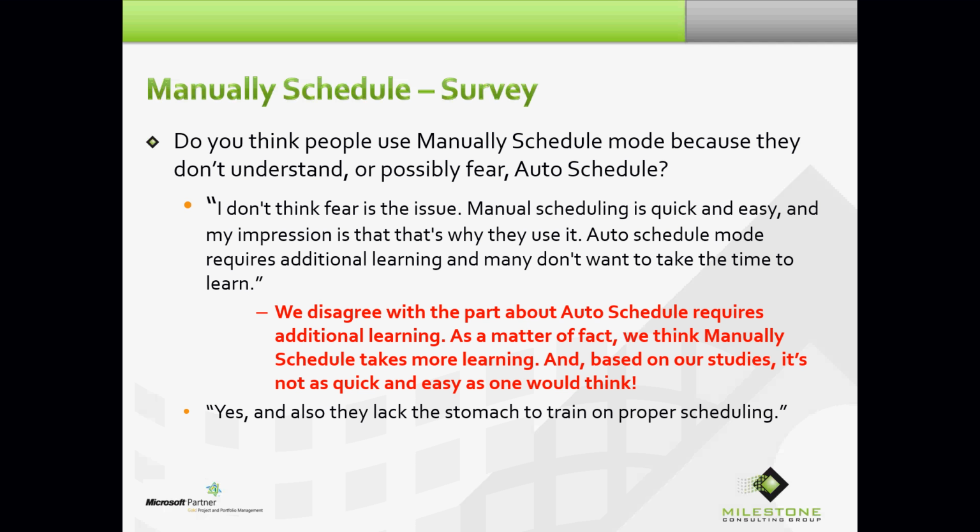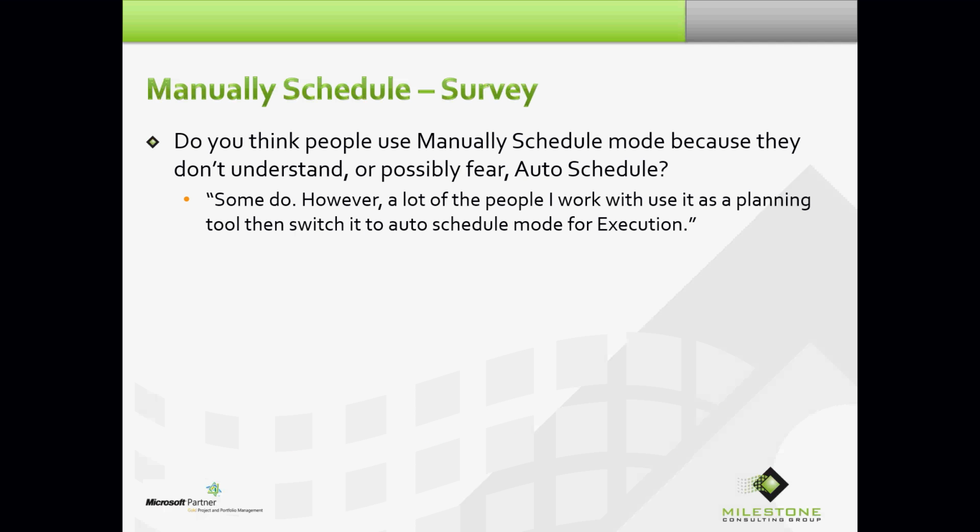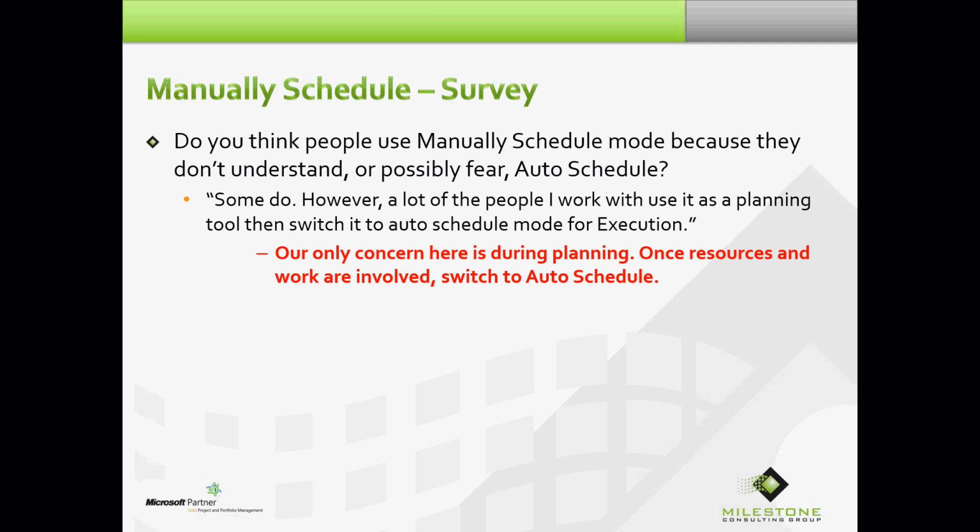And somebody said yes, and also they lack the stomach to train on proper scheduling. Well, I agree, but manually schedule itself does not by default mean you are a proper scheduler. Somebody said some do. However, a lot of people I work with use it as a planning tool, then switch it to auto-scheduled mode for execution. Our only concern here is during planning. Once resources and work are involved, you're much farther along. Switch to auto-scheduled mode and take advantage of the full horsepower of Project.